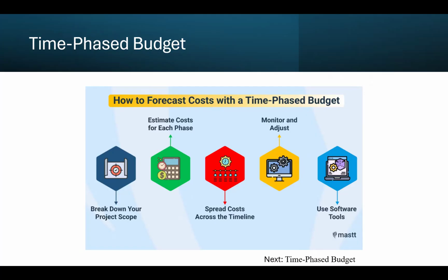But there's a few related tasks that you will complete. So here we go. We break down your project scope. We estimate costs for each. We spread the cost across the timeline. Continue to monitor and adjust it. And as always, you're encouraged to use software tools. And like we heard in that last video, they don't have to have all the bells and whistles in it. It just has to work.